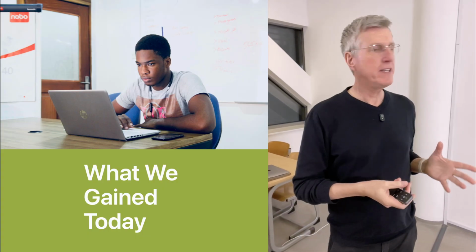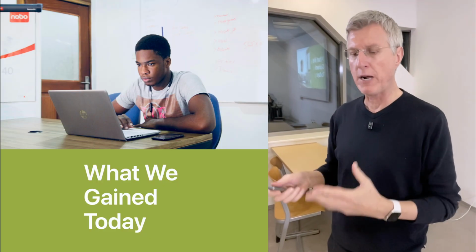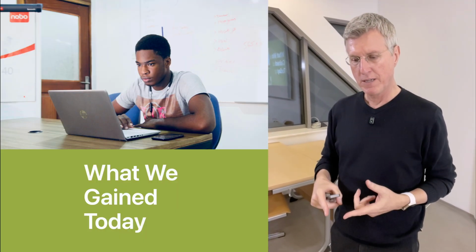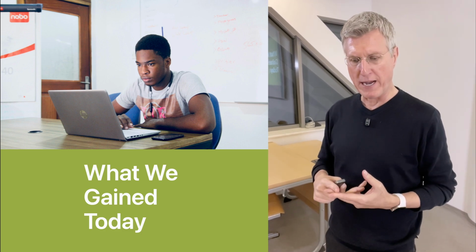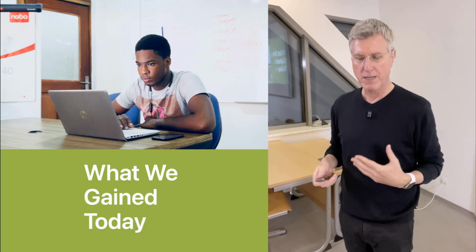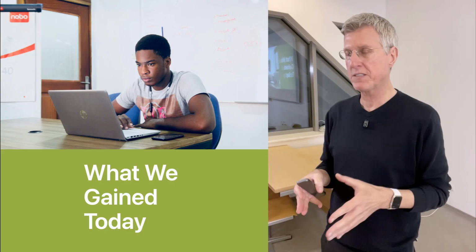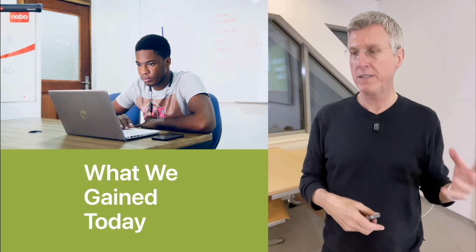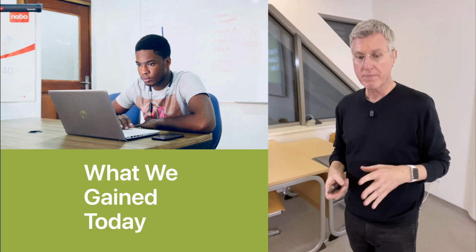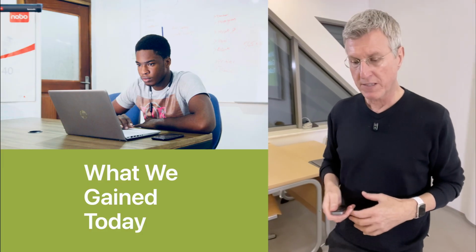But what we covered today is going to help you complete component 4 of your project plan. And that's to do a 3-part risk assessment, which includes the what, why, and the impact, a probability matrix for your top 3 to 5 risks, and your strategic approach to how you will deal with risks in your project through contingency planning and mitigation strategies. And maybe not all risks need both, as Brigesh suggested. I think that's valid, something that we need to think about.